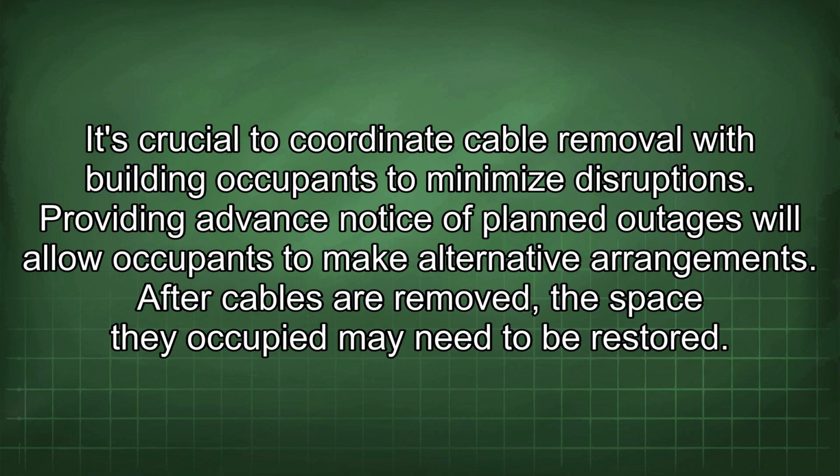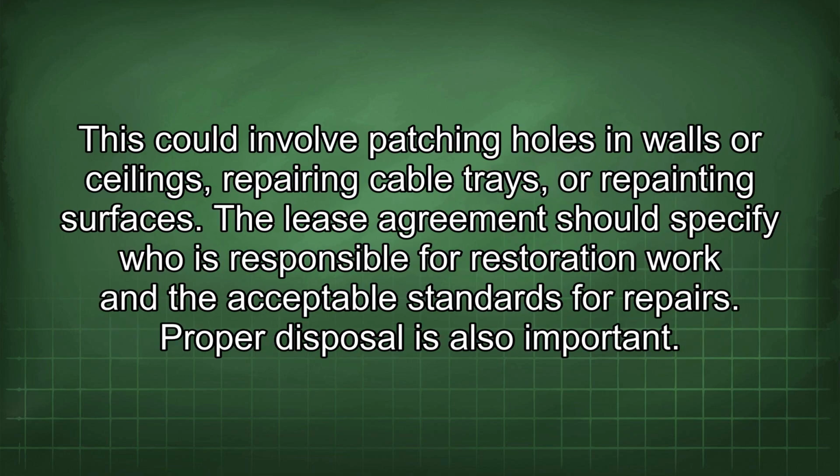After cables are removed, the space they occupied may need to be restored. This could involve patching holes in walls or ceilings, repairing cable trays, or repainting surfaces. The lease agreement should specify who is responsible for restoration work and the acceptable standards for repairs.